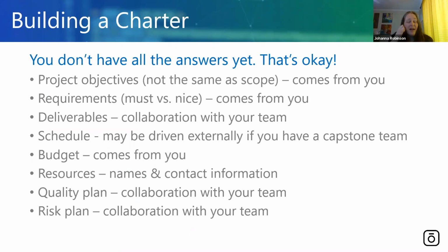So I often start a project, especially if it's a really undefined project, with something called a charter. You can do this as like a 1 or 2 page document, and there's no real heavy lifting involved. You don't have all the answers yet, so think about the document as a living document that's going to get updated as you figure things out, but it's sort of the reference document for the project.